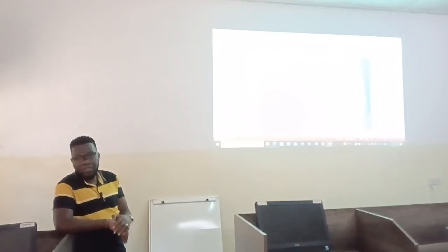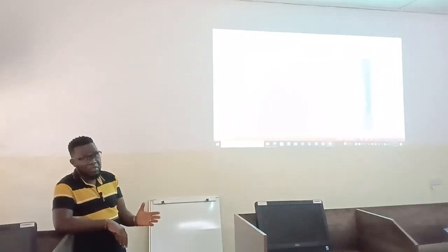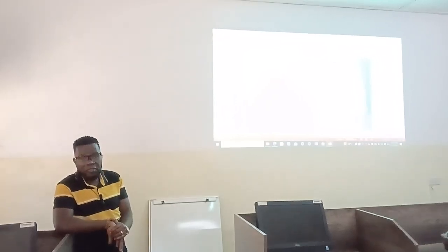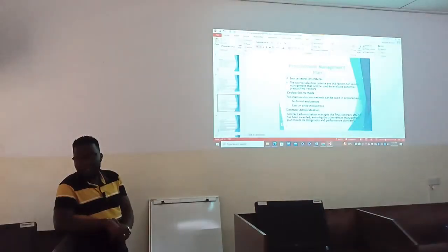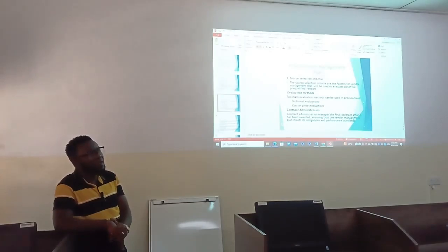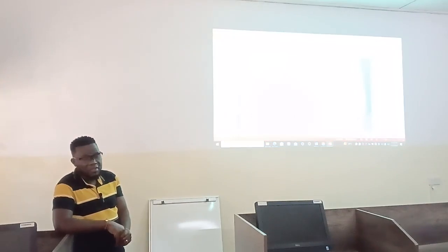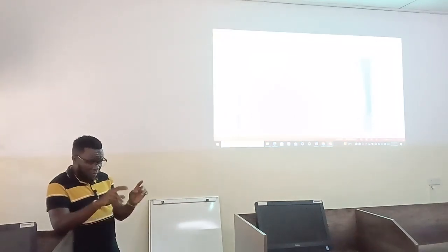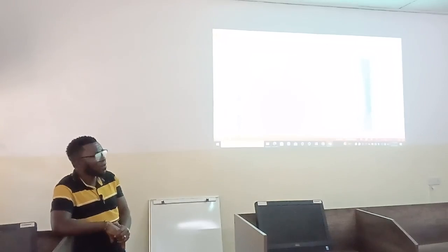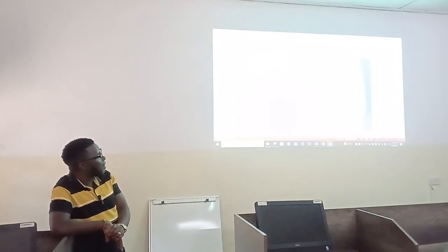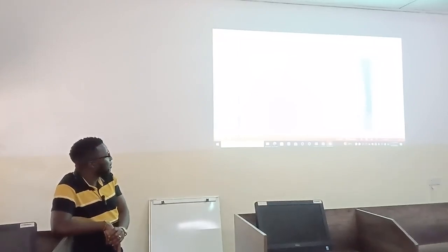If you can recall from previous sessions, when we were discussing bidding processes, we said that when evaluating bidders, we look at them through two angles: the technical side, and then the financial or cost side.